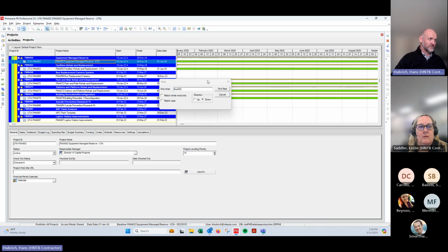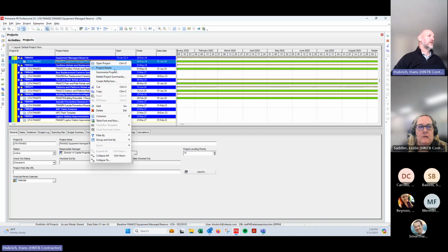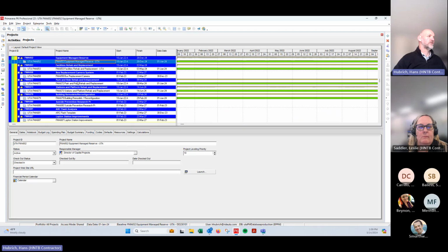So the very first step that I will encourage you to do, I don't do it every time now because updating for me is fairly routine in most cases, and most of my projects are pretty simple. But if you're not sure about the process, or if you have more complex projects that you don't want to mess up, the best practice is to jump in here to the project listing. I just right click, and there are multiple ways to do this. You can use the menus up here also, but for me, a right click is the simplest. And I just say copy, and it's going to copy this entire project.